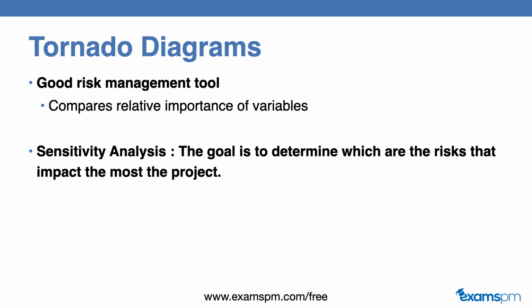Lastly, the tornado diagram is also a form of sensitivity analysis. The goal of the sensitivity analysis is to determine which risk will have the biggest impact on your project. And so when you are planning out your risk management, you will focus on just those risks that will have the biggest impact on your project.